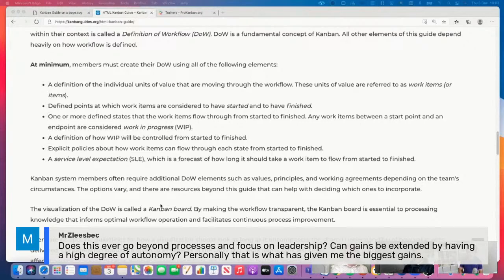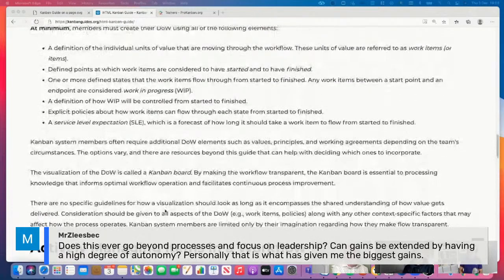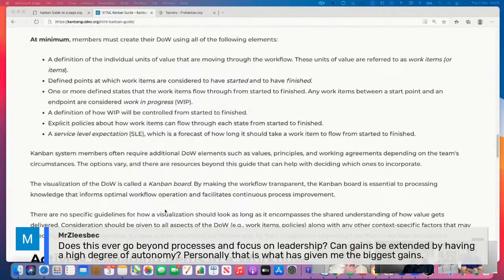Really crucial part of Kanban getting this right, and that's why we spend so much time on getting that right, and that's why there's another practice to review and improve that as well. So defining the workflow, actively managing the items in the system, watching your aging, watching your blockers, and then of course reviewing and improving the workflow. Anything you want to add to that, Dan? No, I think you hit it pretty nicely.